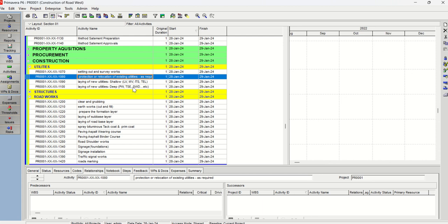Okay, so it would be best to create the next level with stations, and then you can go to type of utilities. Or the next level would be the type of utilities, and then you can go to your stations or the locations as the next step. That totally depends on your project requirements, the way people are expecting, and how you're going to answer scheduling related questions from your project team.